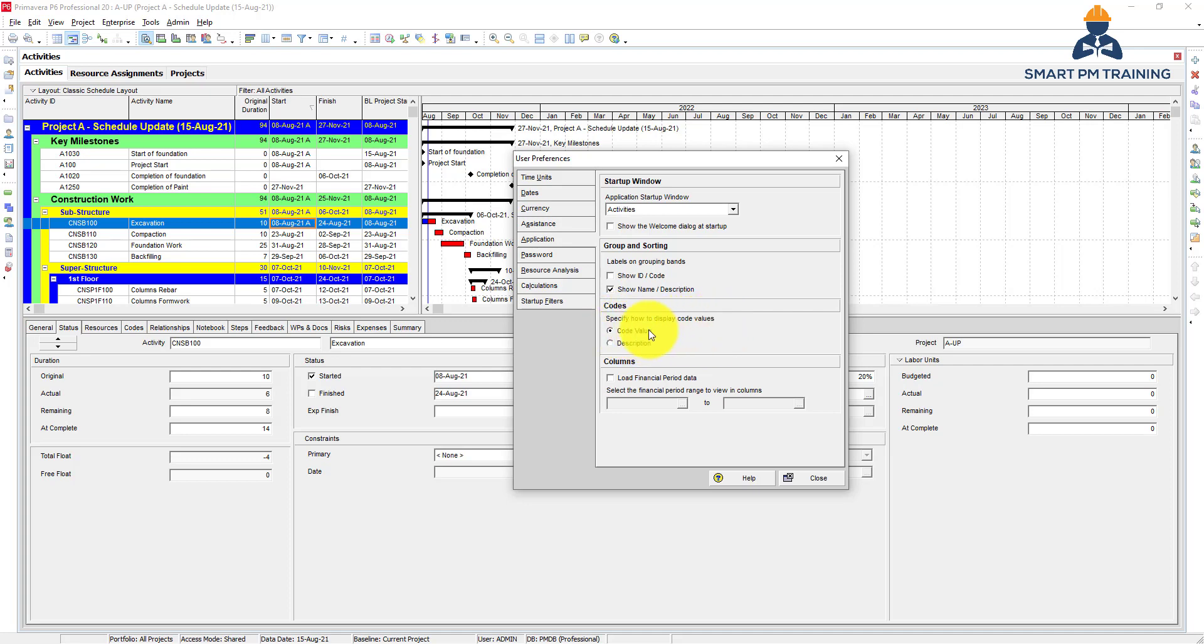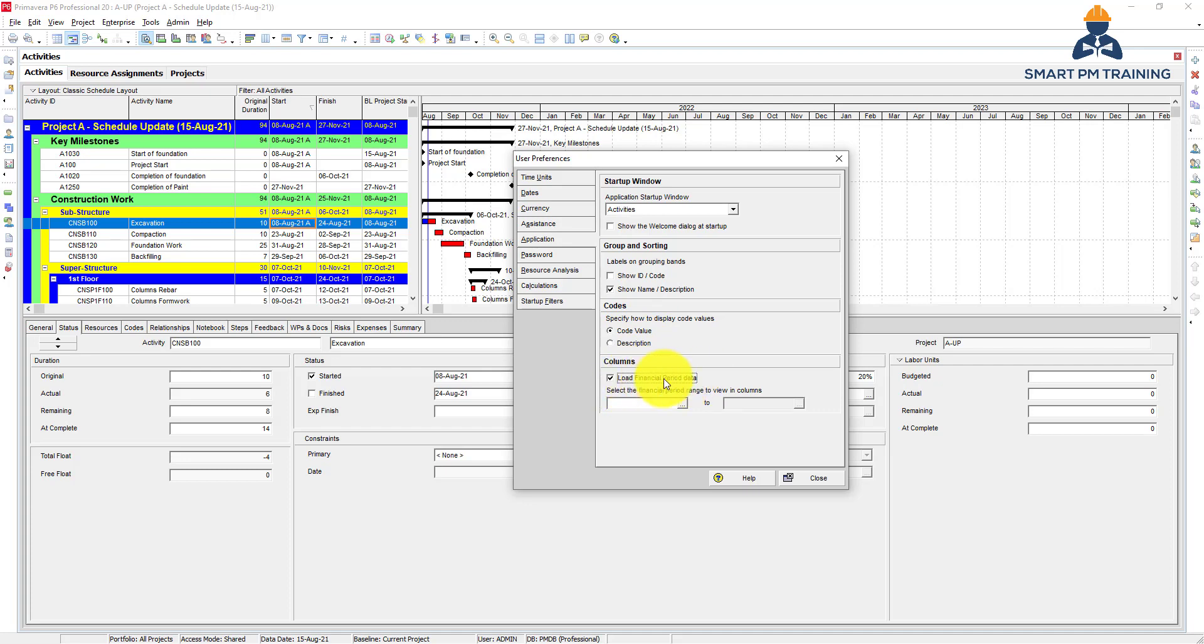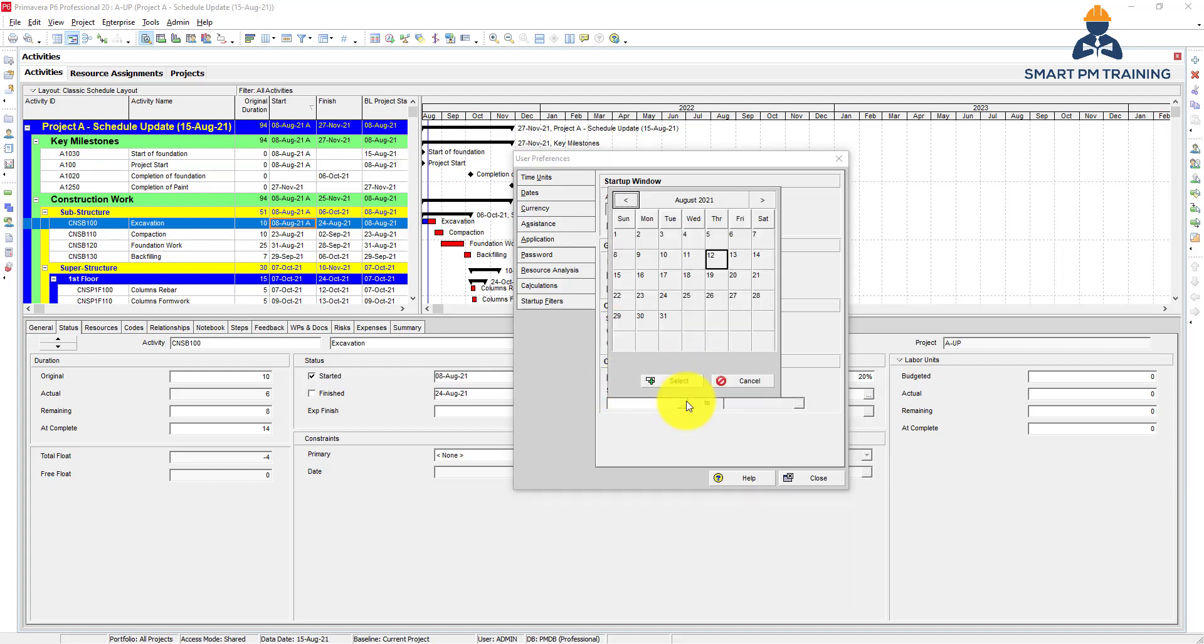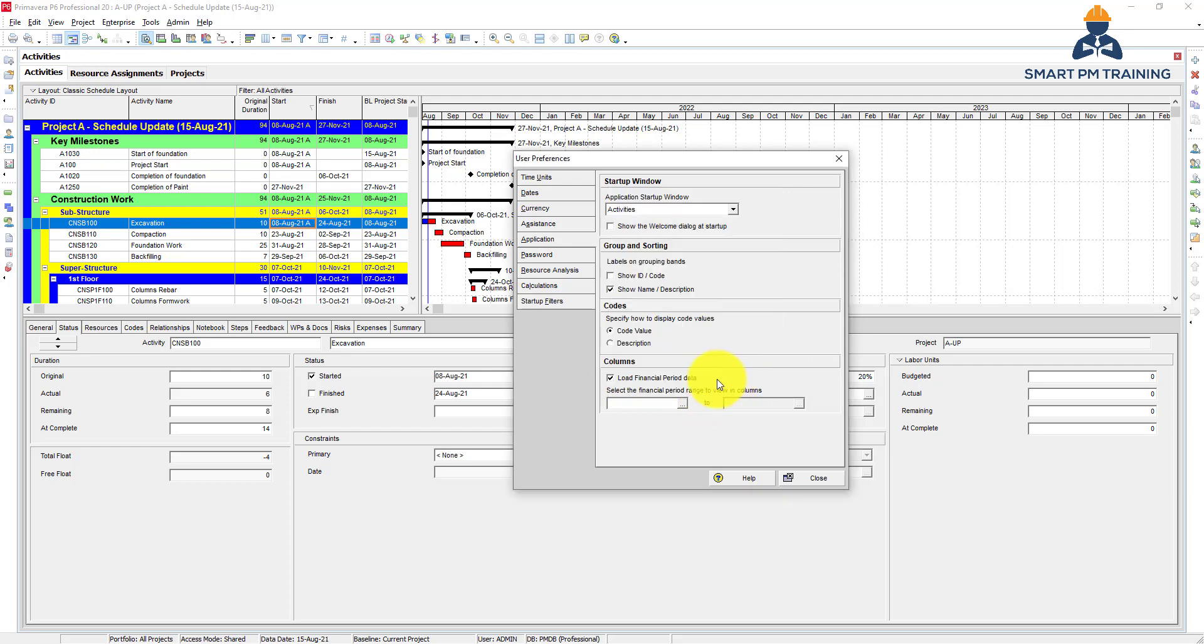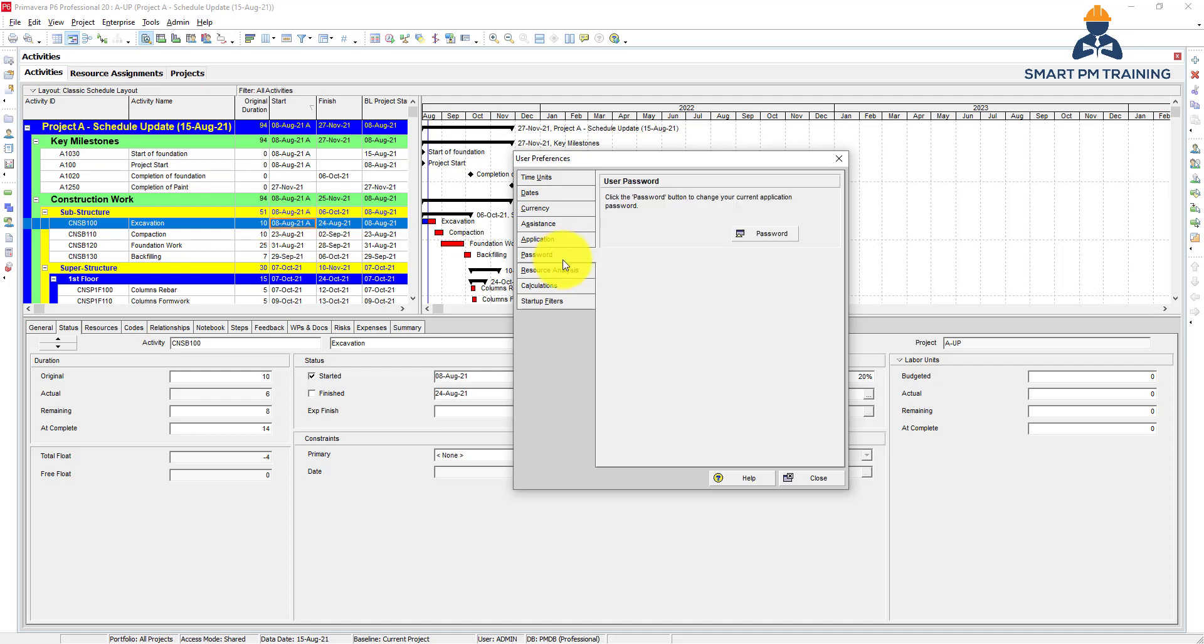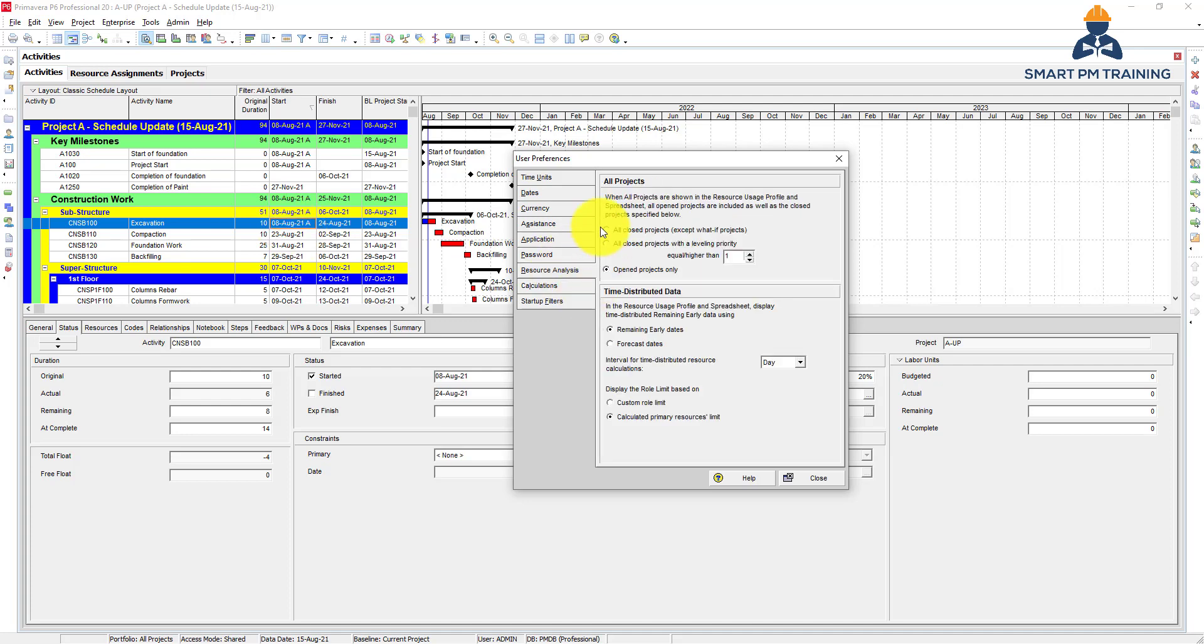Specify how to display code values: code value or description. You can keep code value if you decided to show the codes from here, so you want to show the code value. And this is for columns. You want to load financial period data or not? You can enable it and select your information if you have financial period and loaded financial period in Primavera.